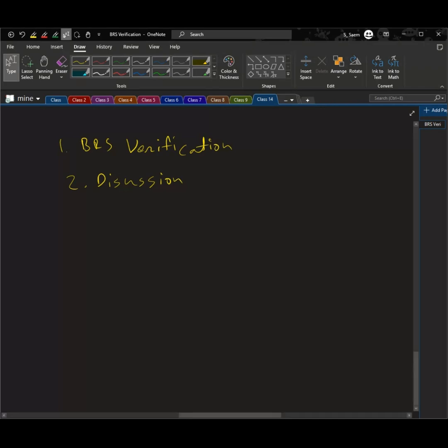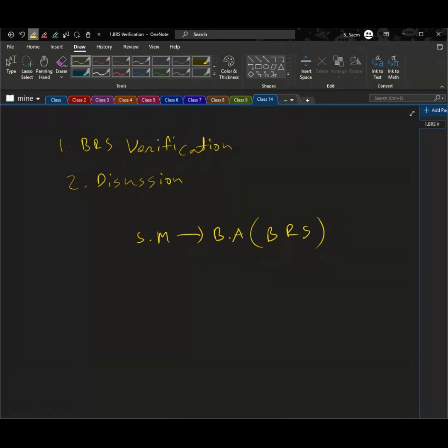Okay. Then before the pre-refinement session, the Scrum Master assigns a business analyst to prepare the BRS for the prioritized stories under each epic. During the session, the team discusses how long it might take, the resources required, and the necessary tools for testing. Okay? Then after the pre-refinement session, the test lead updates the test plan for the first time. The initial draft includes risks, challenges, and other key details identified during this session.